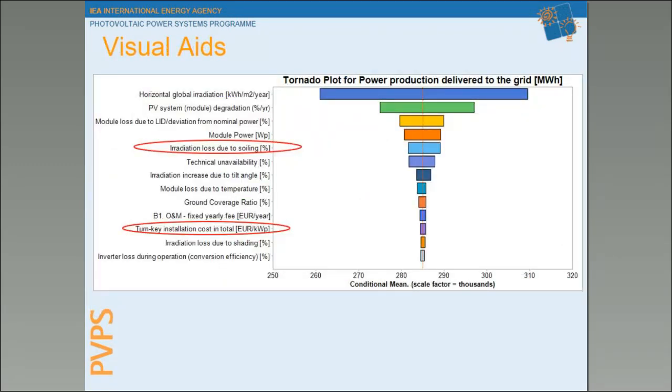Another method for mitigating financial risk is to understand the effect of each parameter on the financial bottom line by using graphical tools to emphasize the interrelation of the various parameters, such as this tornado plot. This type of plot aids decision makers in understanding the relative weight of each parameter and the effect a decision to change a parameter value has on the bottom line. Primarily, it tells us which parameters are most important.